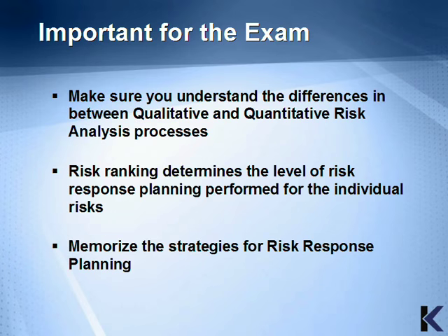Make sure you understand the differences between qualitative and quantitative risk analysis processes. And risk ranking determines the level of risk response planning performed for the individual risks. And make sure you memorize the strategies for risk response planning. This concludes the key items that are important for the exam.